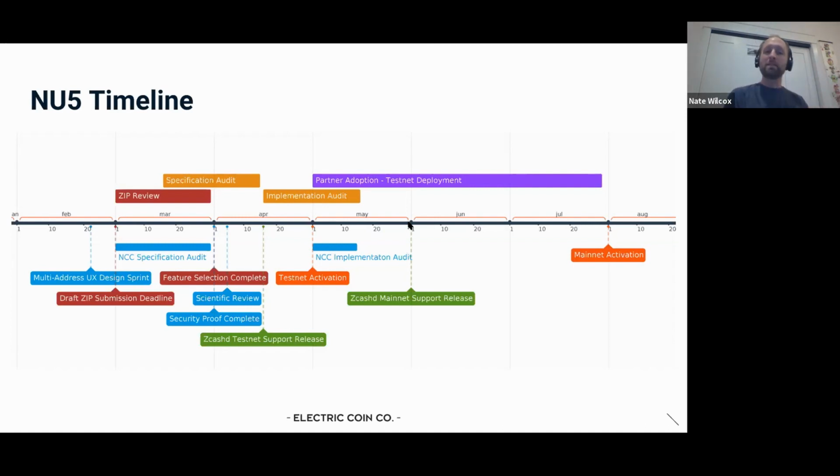So if we've already made that release and then we discover something that suggests we need to patch it, because that is a release that could be active when mainnet activates, that's already complicating the deployment, right? Because we would have to require all users of that release to upgrade, or have some way to mitigate the issue. So that is a tricky date after which mitigations can become more complicated.